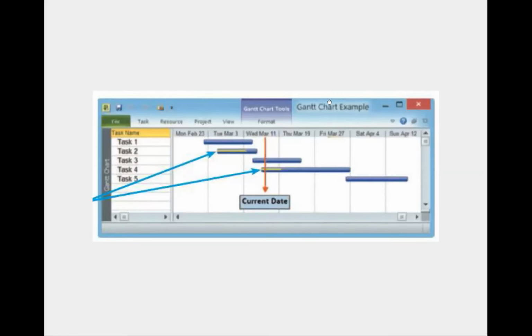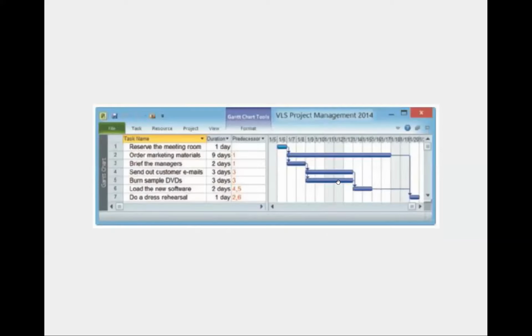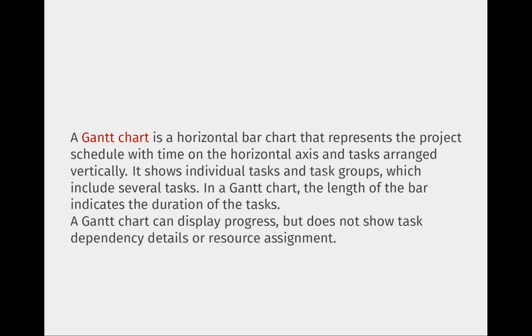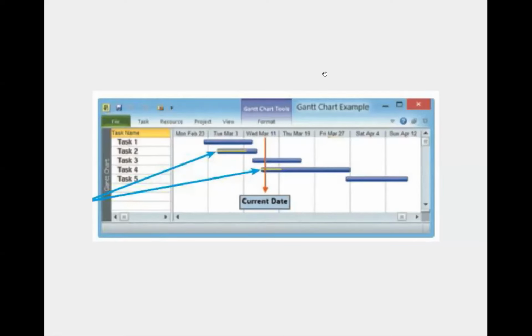Now, this is what we normally design in the beginning of the project. Then we can assess whether you have really done that. Right. So the dates you can see here, and the yellow colors are halfway, they have finished but it's not completed. So you can see yellow indicates the current progress, whereas blue indicates what you actually designed in the beginning.